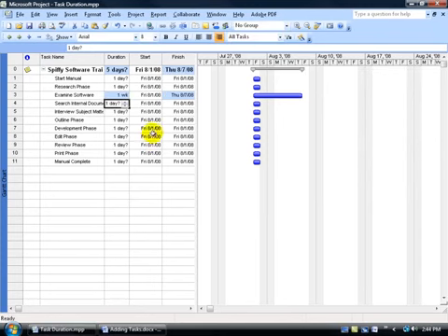So let's get started and start entering in all our duration days for all our tasks here except the project summary task. The reason why is because the project summary task will summarize all the tasks that need to be completed down below. For example, what's the longest task that needs to be completed in order for the project to be completed? Well, it's the examine software. It's going to take 1 week or 5 days. And that's what it's showing up above.